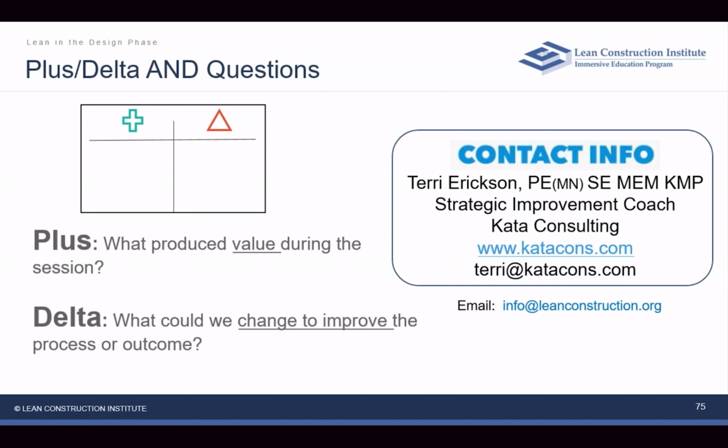Yeah, that's a great question. I don't know if that's coming from an engineer, because often what I hear and what we do is we price our value based on doing a design one time. So the key is that in set-based design, it's holding us back from executing that design fully. It may require negotiating our contracts so that we're talking in terms of set-based design.